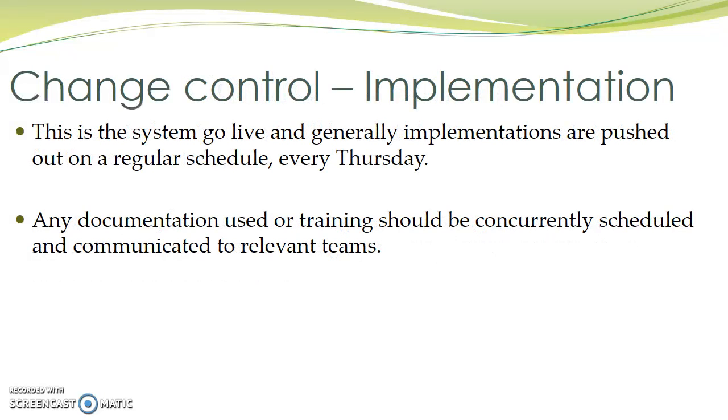Implementation. This is the system go live, and generally implementations are pushed out on a regular schedule. In the case of Meadowview Hospital, this will occur every Thursday as needed. Any documentation used or training should be concurrently scheduled and communicated to relevant teams.